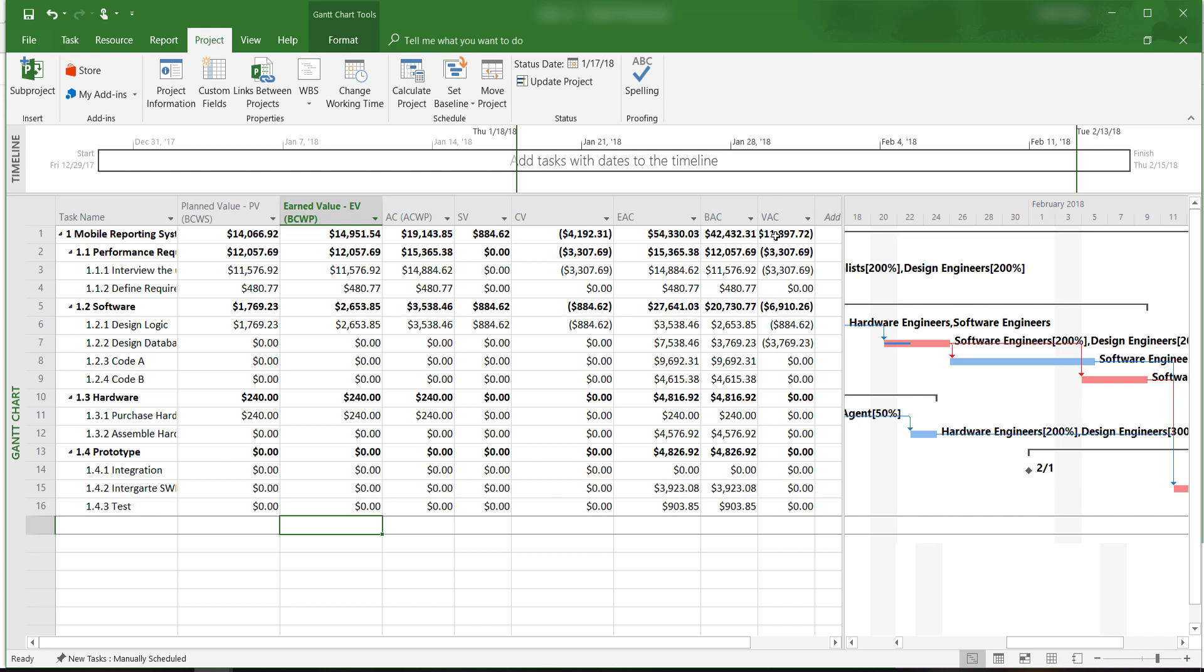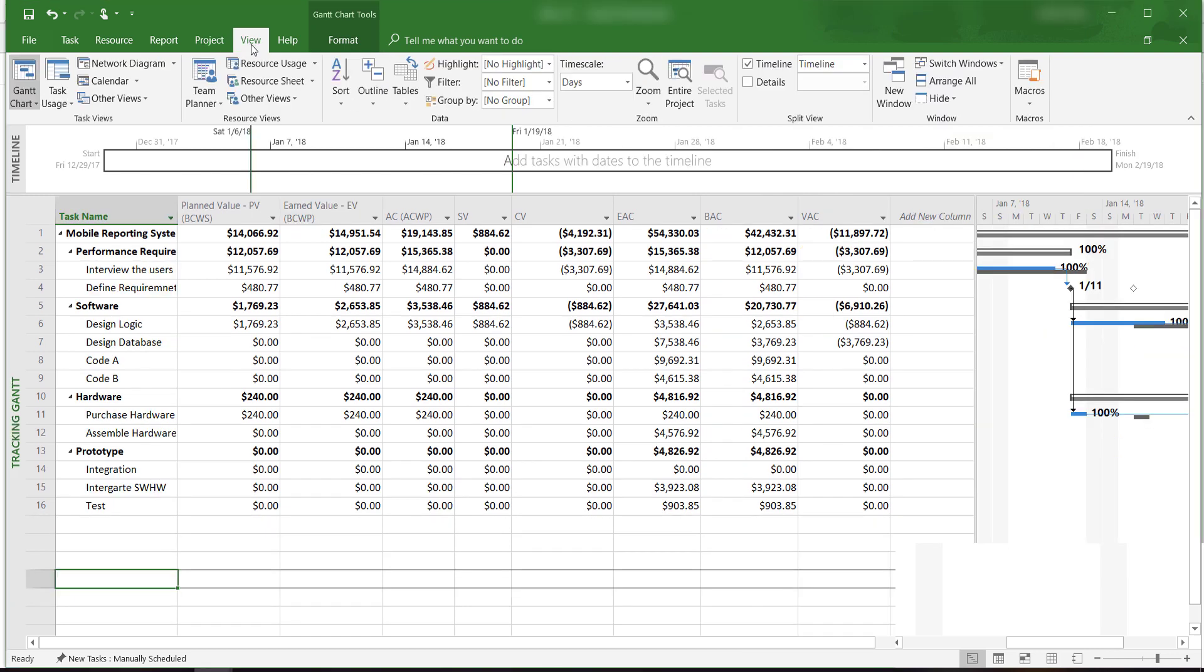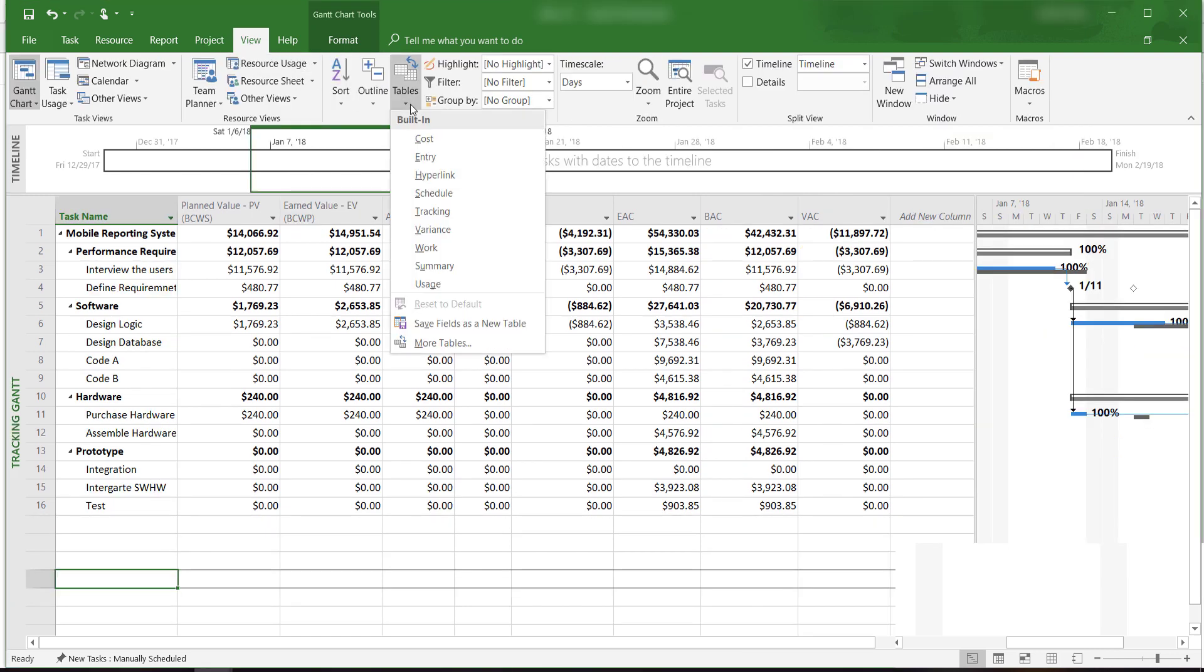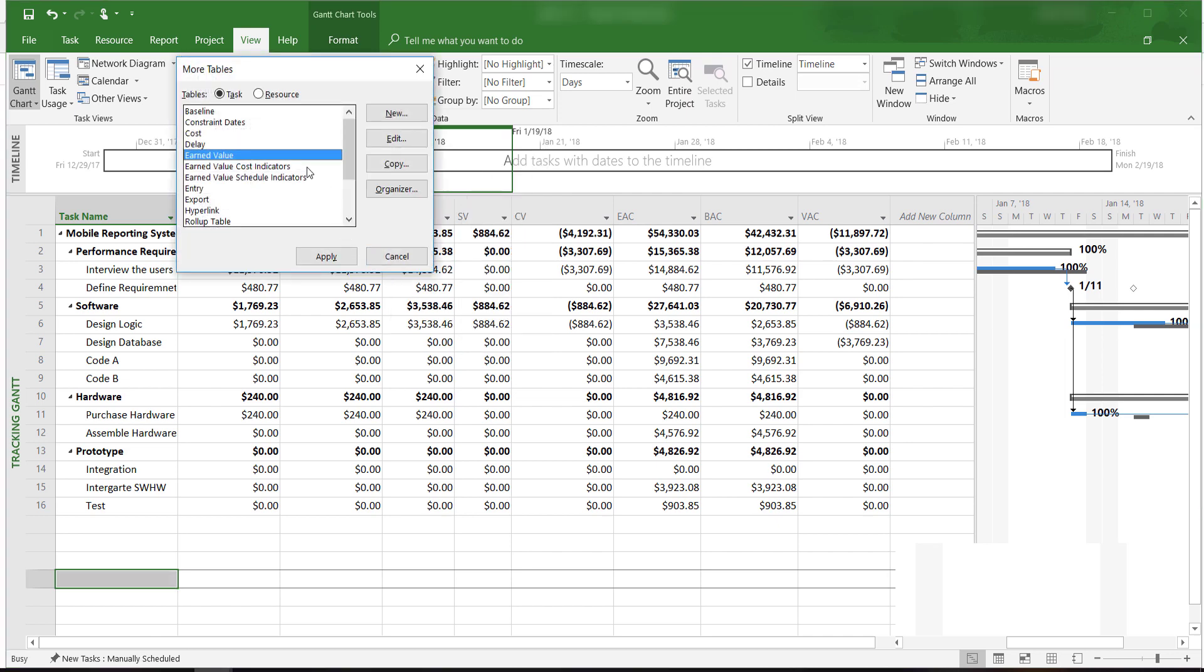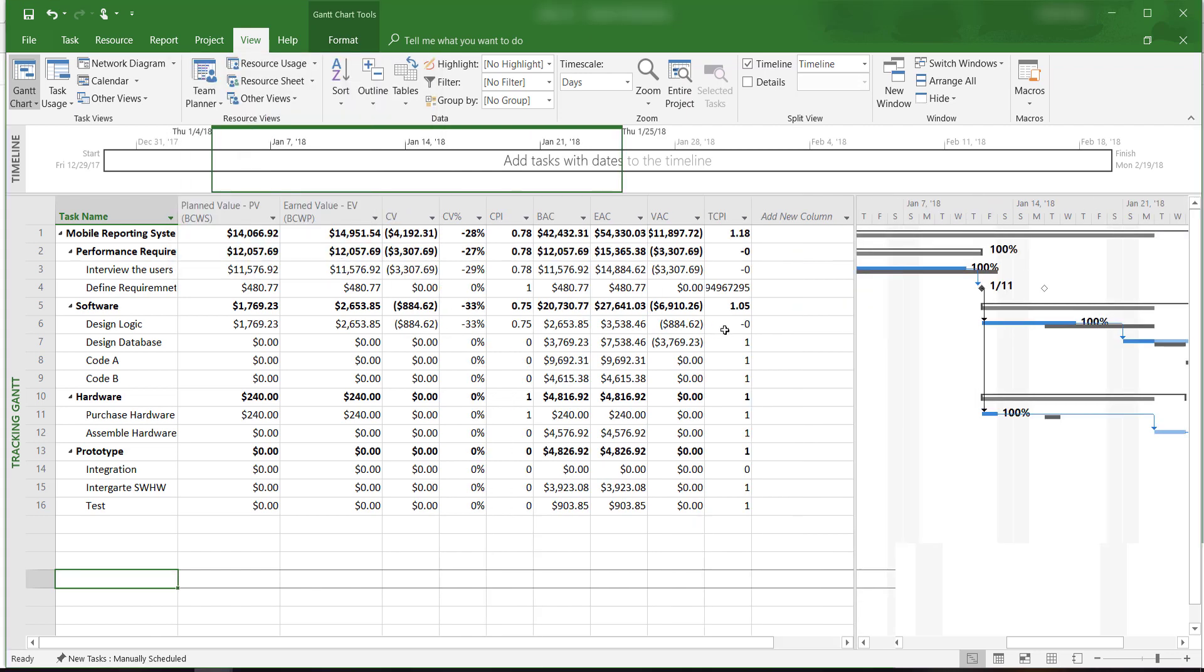The basic earned value table doesn't show the cost performance index, CPI, and the schedule performance index, SPI. In order to find the CPI, click on the View tab and then on Tables. From the drop-down menu, click on More Tables, scroll up or down to find the cost indicator table, then click Apply.